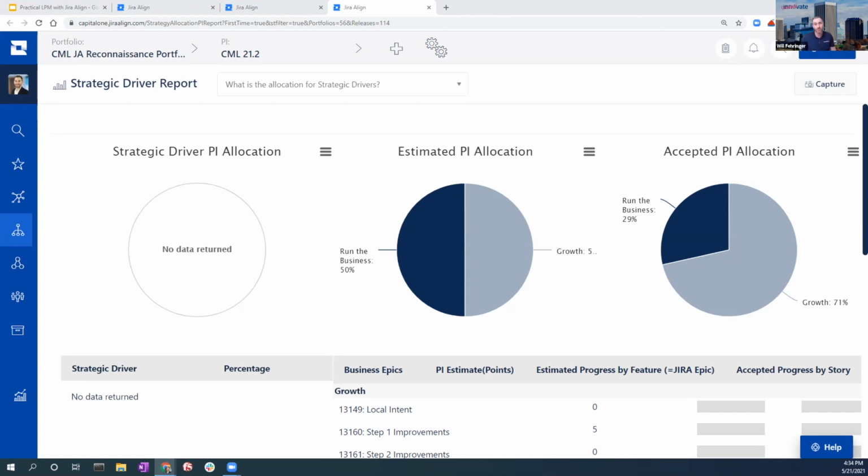Now, the other benefit was that we were able in certain portfolios to start talking about what is our capacity allocation. As we're getting more and more historical data, we're starting to get a pretty good idea of how our capacity is being spent in our different portfolios over time. And we're starting to have conversations about what we can do to sustainably change our capacity allocation.